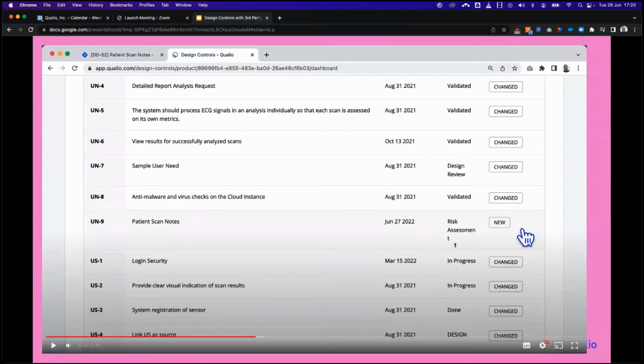This field here is where we will pull the Jira issue status. So as your engineers are working in Jira, if they add a requirement, within 5 minutes, it'll be pulled into Qualio. In that amount of time, they might not have completed the work required, so they can use this status that is pulled in from Jira to inform whoever is managing the Qualio side. This status can inform them where that engineer is at with the work required.